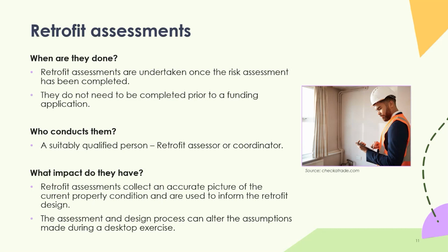The assessment process and the design process, as it says at the bottom, can alter the assumptions made during a desktop exercise. So that's really meaning that the on-site assessment and the subsequent design based on that assessment might be quite different to assumptions made by a client, an applicant for their funding, who might decide they want to do external wall insulation, lofts and/or windows options for properties that they're going to be submitting. But actually an assessment might change that assumption, sometimes quite dramatically.